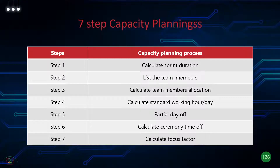Now, capacity planning — this is another thing the scrum master does during sprint planning. Capacity planning involves planning the team's capacity to see if they can take up the story points. It's usually a seven-step process. Step 1: calculate the sprint duration. Step 2: list all team members. Step 3: calculate team member allocation — which team member is taking up which stories.